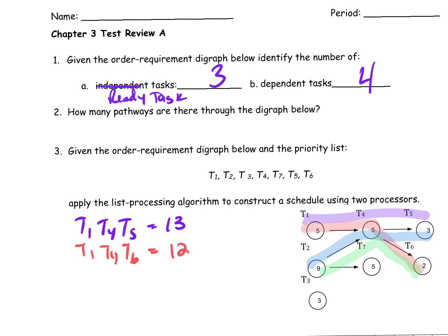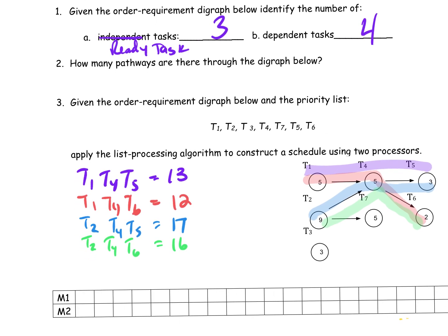My next path is Task 2, Task 4, and Task 5. I add up those completion times: that's 9 plus 5 plus 3, that's 17. And then I have another one starting at Task 2: Task 2, Task 4, Task 6, which is 9 plus 5 plus 2. And that's 16.